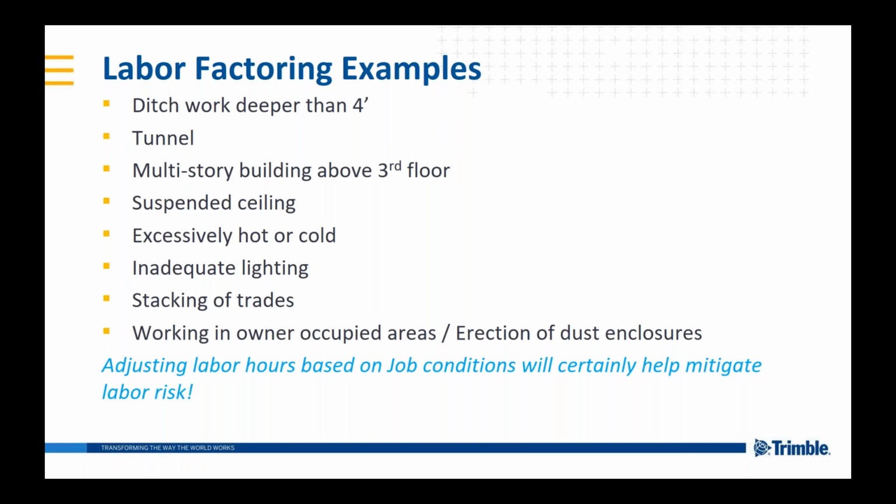Also, working above a suspended ceiling. We all know the impacts of doing that: removing ceiling tiles, putting ceiling tiles back. Did you break any tiles? And then trying to get our work, whether it's pipe or conduit, above that ceiling can be tricky.